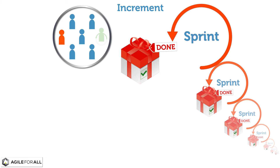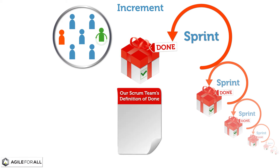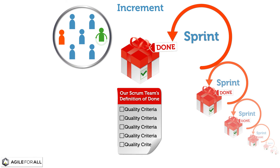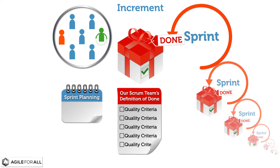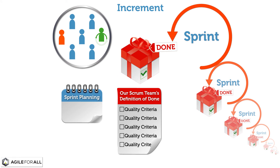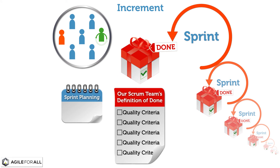In order to assess when work is complete on a product backlog item or an increment, the Scrum team creates a shared definition of done. This definition provides transparency about the level of quality that is considered sufficient to release an increment. The definition of done guides the development team in knowing how many product backlog items to select during sprint planning, since the purpose of each sprint is to deliver increments of potentially releasable functionality that adhere to the Scrum team's current definition of done.